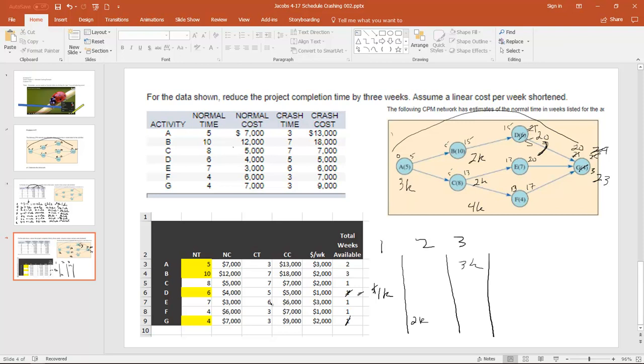How many dollars did it take? Well, we achieved the goal. We went down to 22 weeks, okay? And the way that we did that is we chopped this down to 4, and that 4 would ripple through everywhere here, and we'd end up with 22. I'm not going to go ahead and do that. It's already kind of messy, the way that this online pad works.